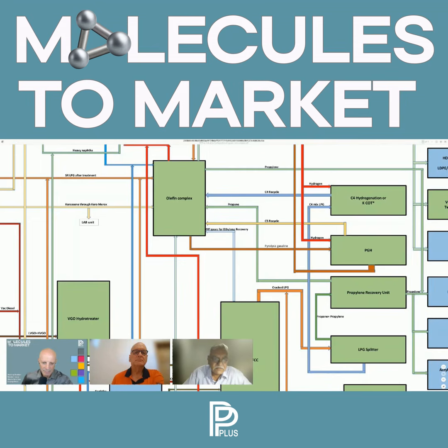So at this stage, the order of magnitude, because I have not done the licensor selection, is only plus or minus 30%. You can call it order of magnitude also. So this feasibility report actually sets the direction of the project. Now here actually in India, we get a stage 1 approval on this.